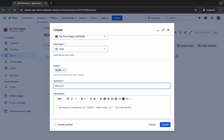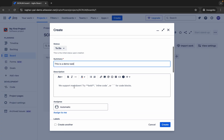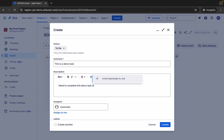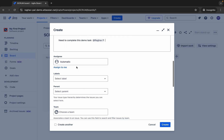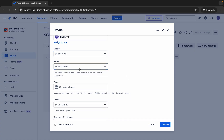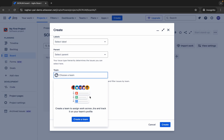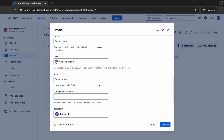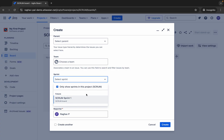I will say this is a Demo Task and add a description. You can also use @ to mention someone in your team. Then for the Assignee, you can keep it automatic or assign it to yourself. If you have any labels, you can add them here. If there is a parent issue, you can assign it here. You can also assign it to a team, and if this is a scrum project with sprints, you can select the sprint in which this issue will be created.